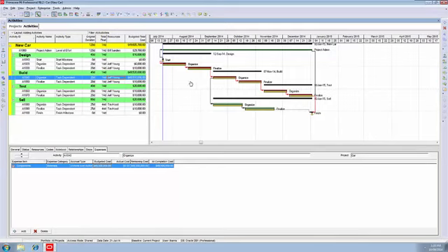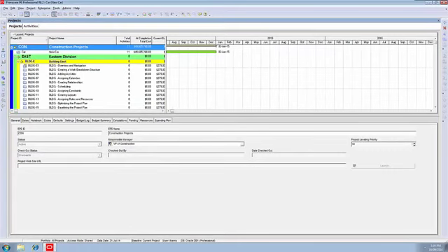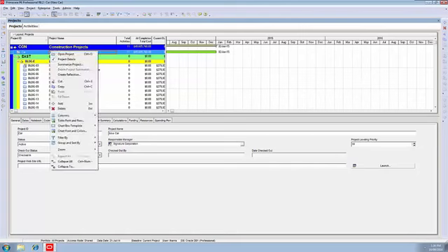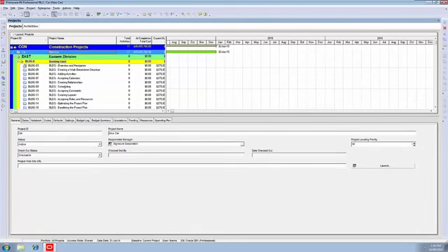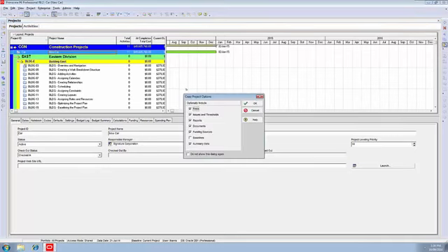So the first thing we have to do is think about safety, and we should be making a backup of our project because this is a time when things could go wrong dramatically. So we need to make sure that we've got a copy of our project available just in case things do go wrong. The way we do that is we go back to the projects window, we highlight the new car project, and we right click on it, and we say that we want to make a copy. We then come over to the right, find the paste button, hit paste.